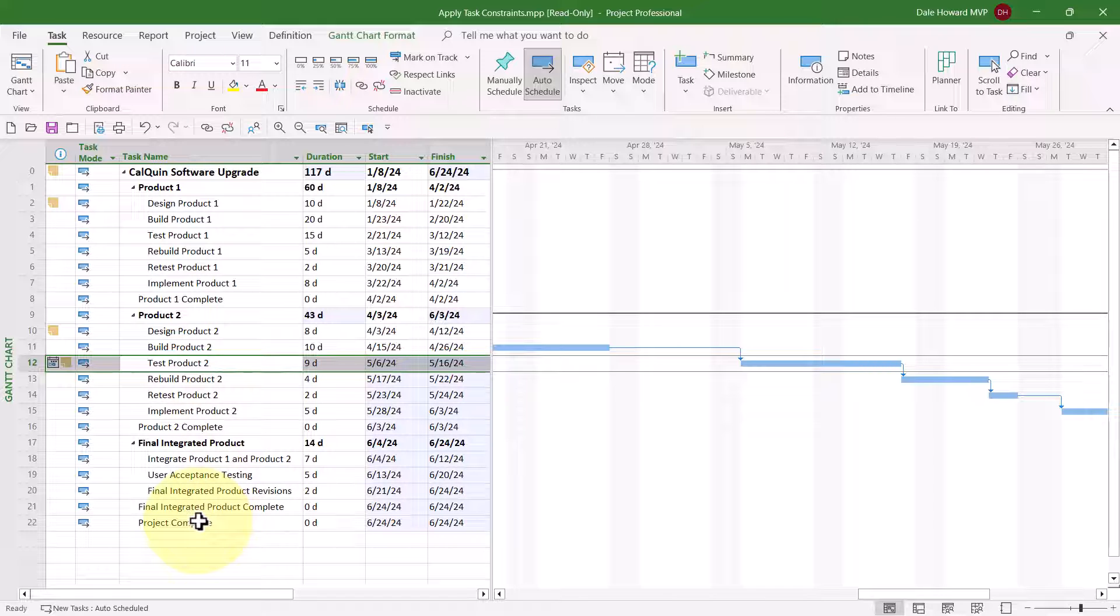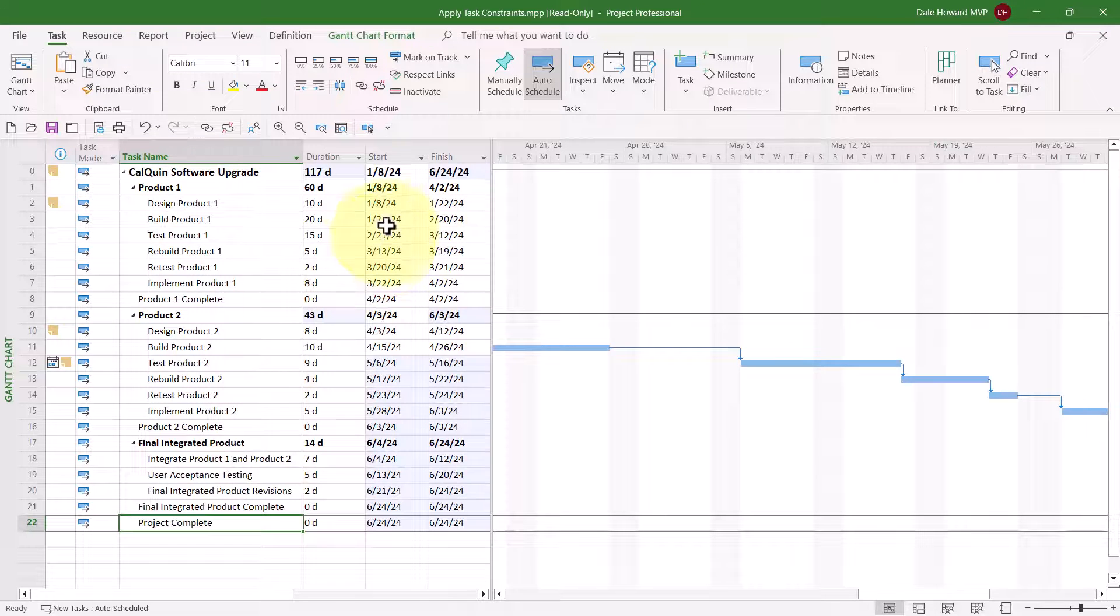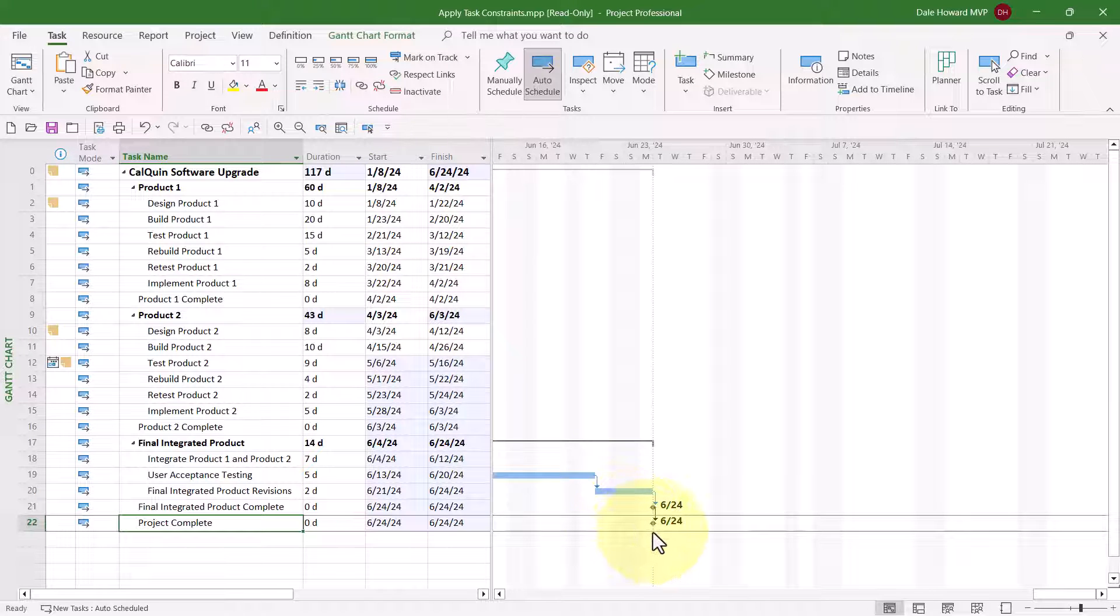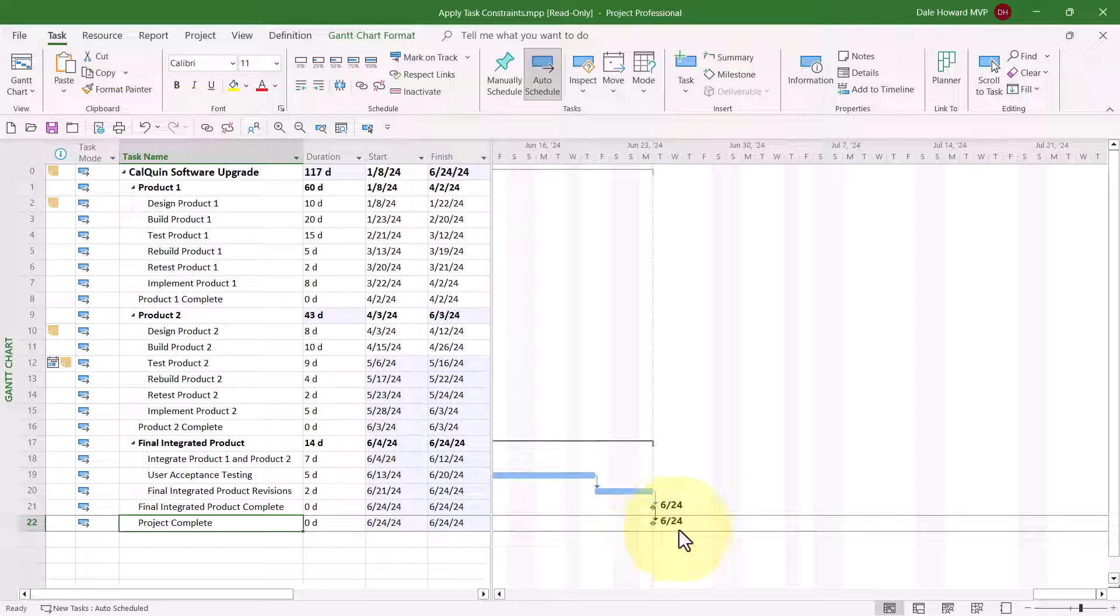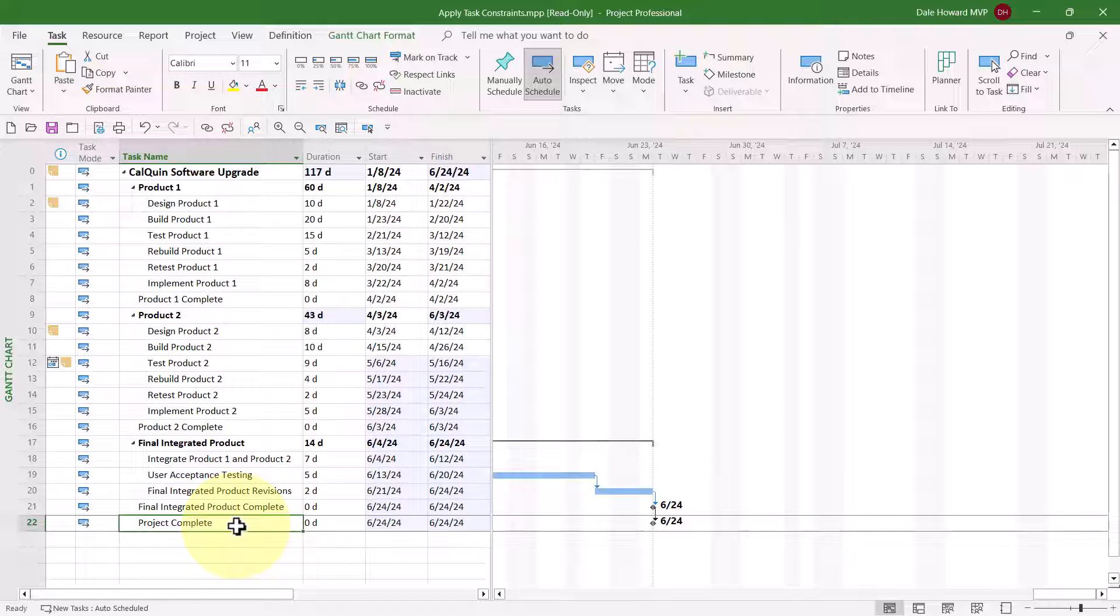The other task that needs a constraint is number 22, the final milestone, Project Complete. You can see that this task is currently scheduled to finish on June the 24th. That means the project will finish on June the 24th. However, we have a contractual finish date with our project client who needs the project to absolutely be done by June the 28th, by Friday, at the end of that week. So let's go ahead and set another constraint.